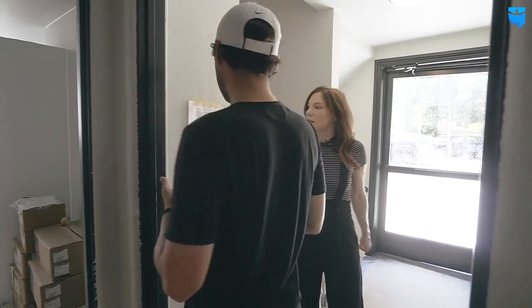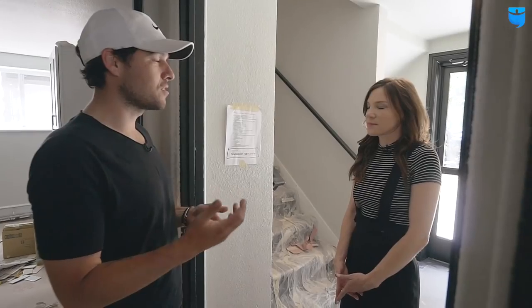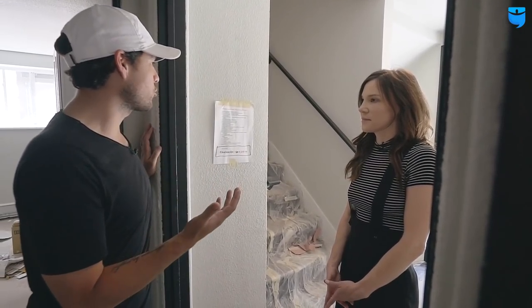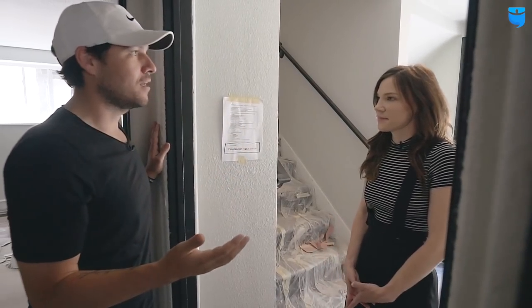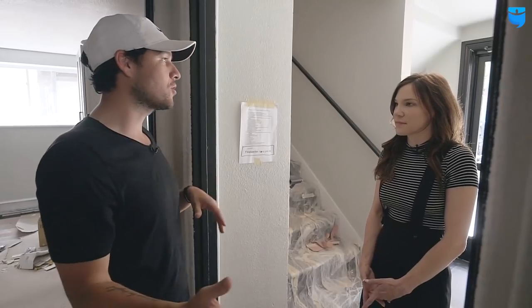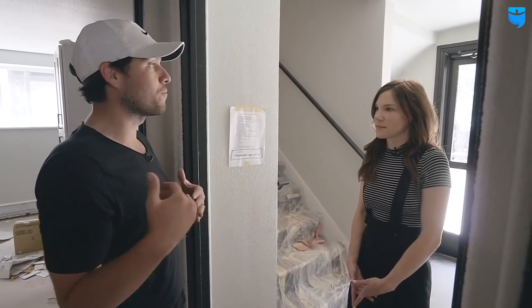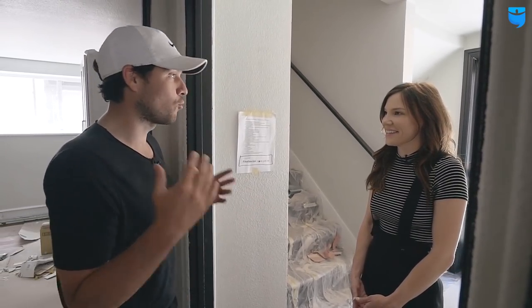So one of the things I wanted to point out, since we've talked a lot about construction, I know your background in helping single family fix and flippers, is one of the things I learned when you start doing larger projects is you have to write down the punch list in every phase. Because what happens is guys end up taking longer lunches, they think they're really ahead when they're not, and things can fall really behind. On single family, they can fall behind. Oh, absolutely. But on a project this scope, they can fall really behind.